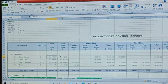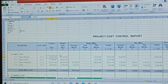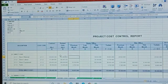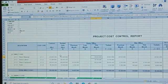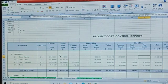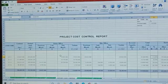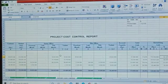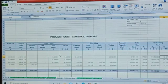The costs that are included during the project I divided into two classifications: home office project cost and site office project cost. You will see also remaining cost, the remaining cost to the contract.